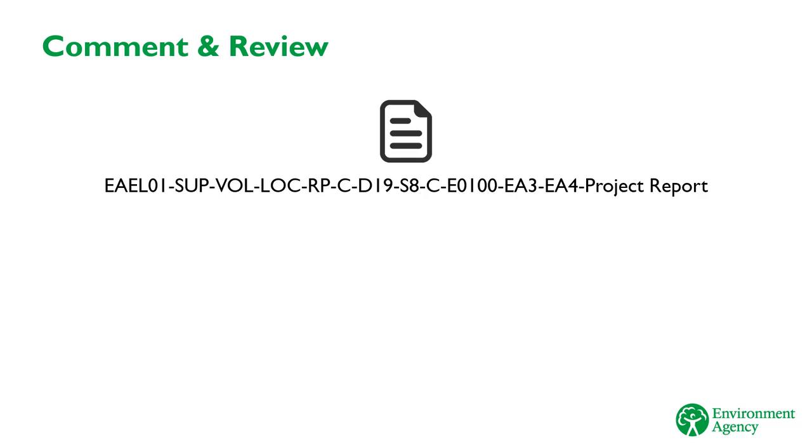The first is to use the review functionality in A-Site to make comments or annotations to the supplier's document. This way, we're not changing the document, only adding comments over the top of it, which means that the author retains responsibility. For some types of documents, this isn't practical. For example, longer documents such as reports.